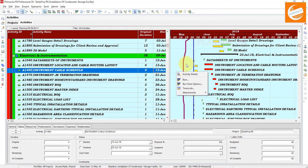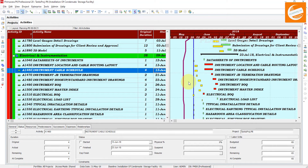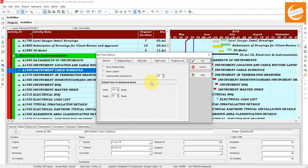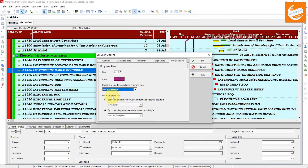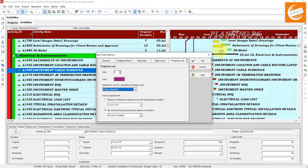Now you can see the color has already changed to that selected color. In the Bar Chart option under Progress Line, if you want to choose the percent complete or duration complete option, you must choose the primary baseline, because we are showing only the primary baseline here.